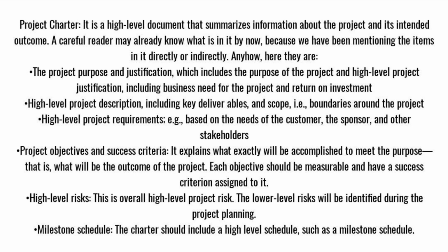Project Charter. It is a high-level document that summarizes information about the project and its intended outcome. A careful reader may already know what is in it by now, because we have been mentioning the items in it directly or indirectly. Anyhow, here they are. The project purpose and justification, which includes the purpose of the project and high-level project justification, including business need for the project and return on investment. High-level project description, including key deliverables, and scope, i.e., boundaries around the project. High-level project requirements, for example, based on the needs of the customer, the sponsor, and other stakeholders.